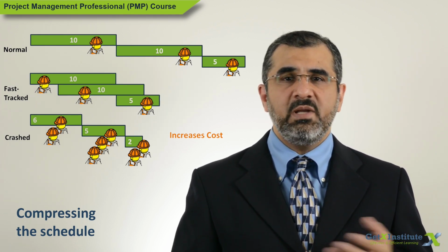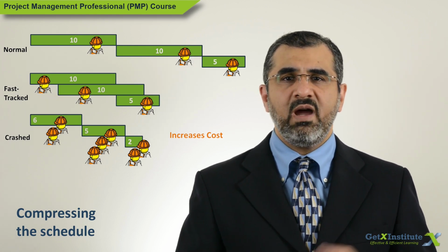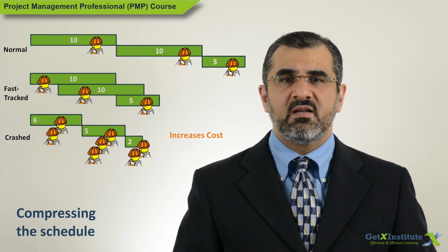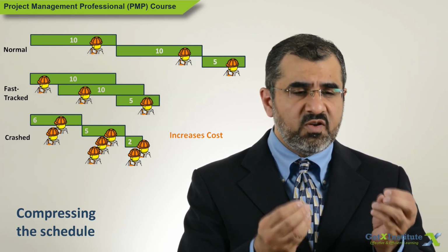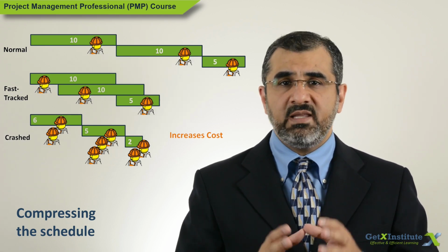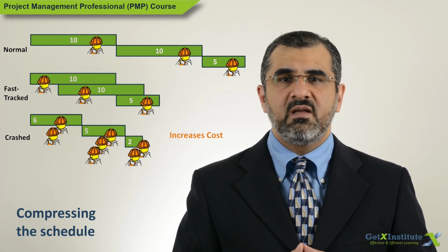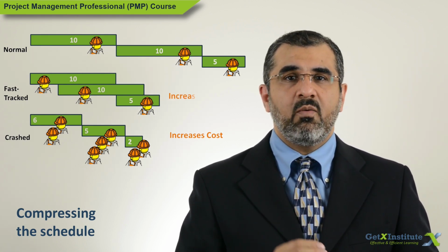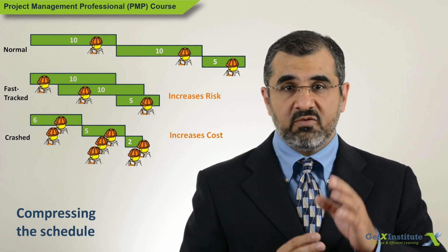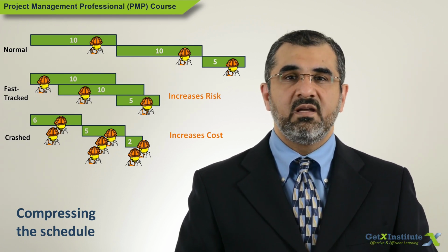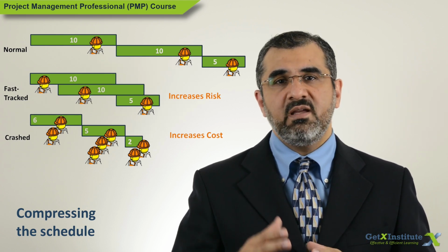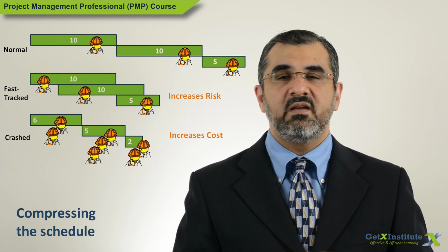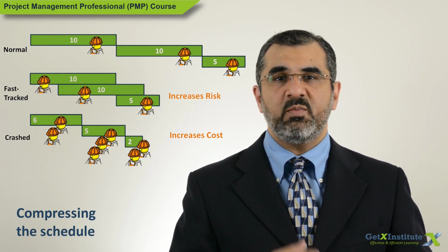So for example, complete design and then construct. Why wait for the design to be 100% complete before construction can start? Say construction can start once 50% of the design is done. By the time the remaining 50% is completed, construction is well on its way. The challenge is, what if there is a design update to the already completed 50% design because some changes happened in the later part that necessitated the change? That is the risk inherent in the fast tracking approach.